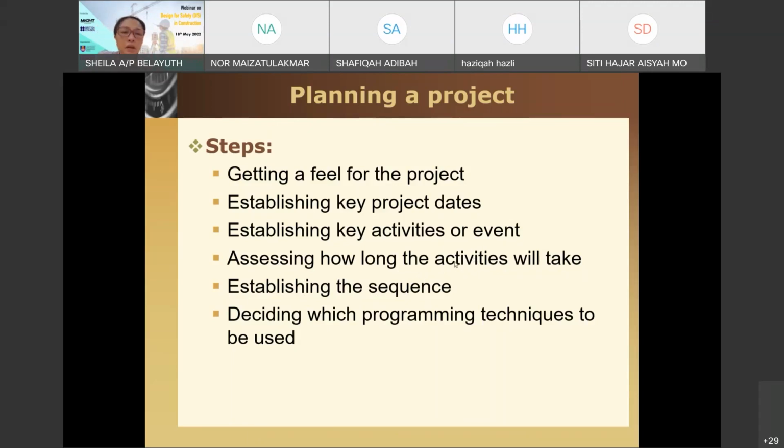But I think overseas, there are countries that came up with indicators. To concrete a certain meter square of slab, with how many people, it requires how long. So there are some notations as such. To concrete a column, how long will it take? Even with that, it's quite difficult because the human resource will be different. If you place probably an Indonesian worker as compared to a Bangladesh worker doing concreting work, you might get a different result.